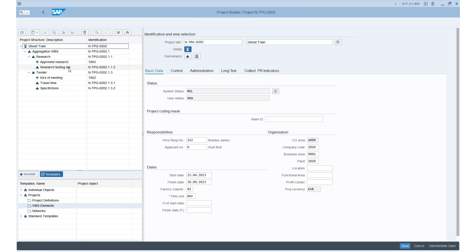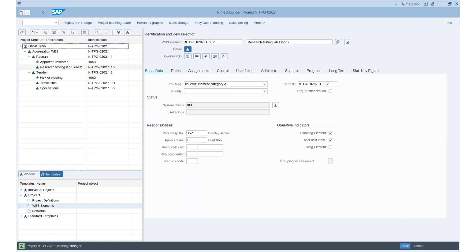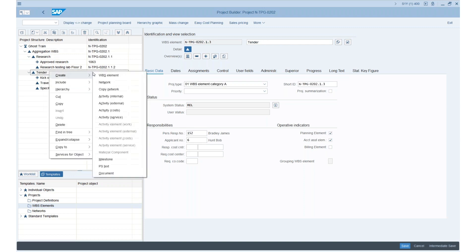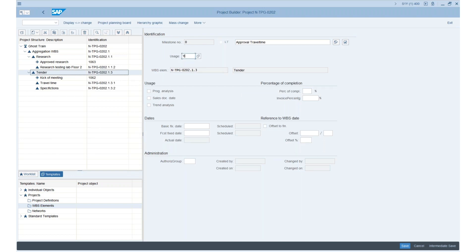Let me make some more changes. Let's say our research testing lab has moved to floor number two. And last but not least, I want to have a new milestone within the tender — I'll create a new milestone to approve the travel time. This should be done quickly, so the finish date should be tomorrow. I enter the date, press save, and we have a new milestone.